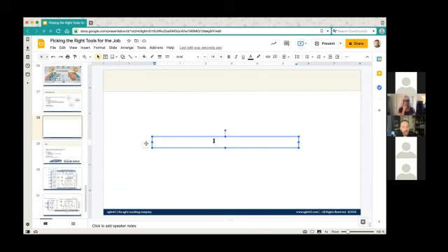Slides is being difficult. It says that to overcome a resistance to change, you need a dissatisfaction with the status quo, a vision for the future, and concrete first steps, right? And so what you're calling out is that there's no dissatisfaction with the status quo. And so how people fabricate dissatisfaction is stick something in front of someone that they want, but they can't have it because of their current circumstance. And now the fact that they can't have it makes them dissatisfied with the status quo.